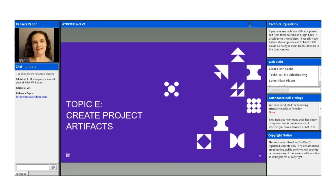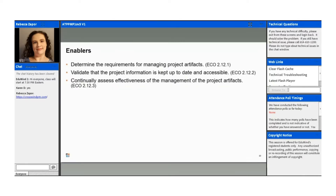Now we're going to talk about creating project artifacts. Projects create deliverables — there can be interim or final products at the end of the project scope. Projects also create artifacts throughout the life cycle, including the project management plan and all of its sub-plans, the scope statement, status reports, and other things that are part of project communication.